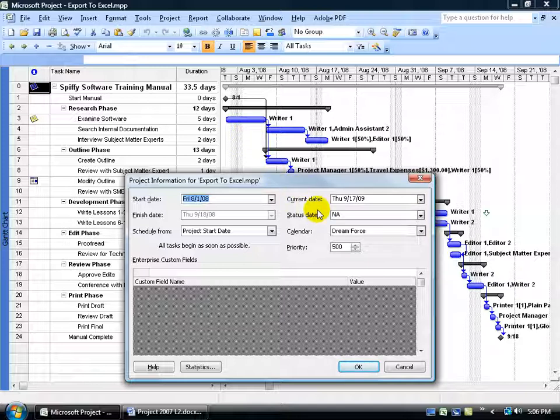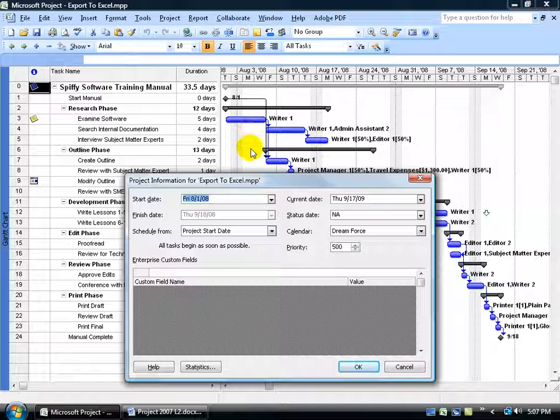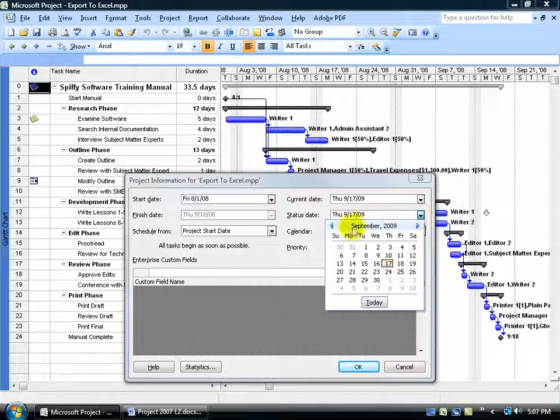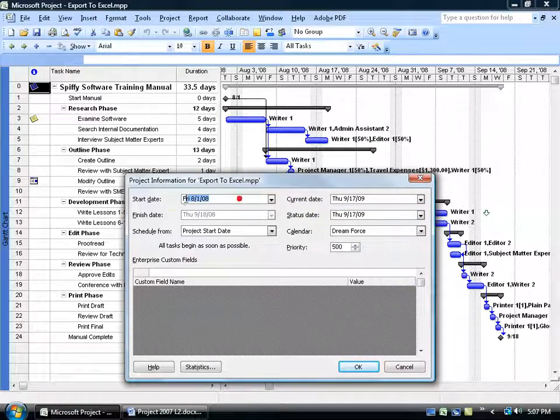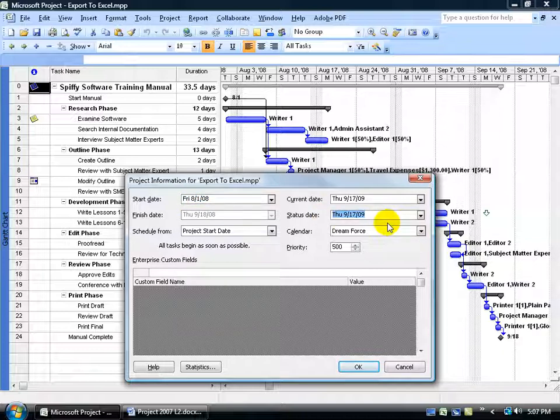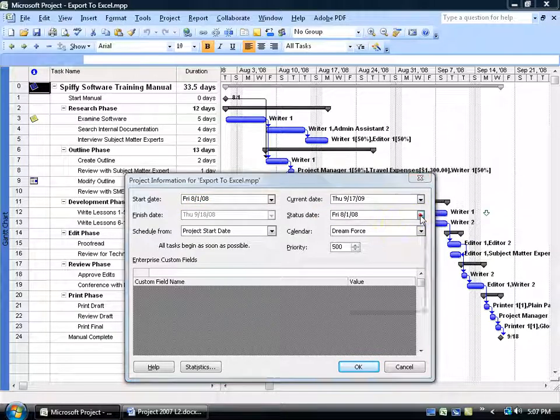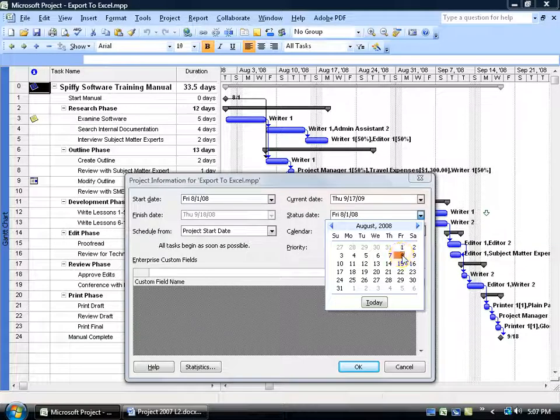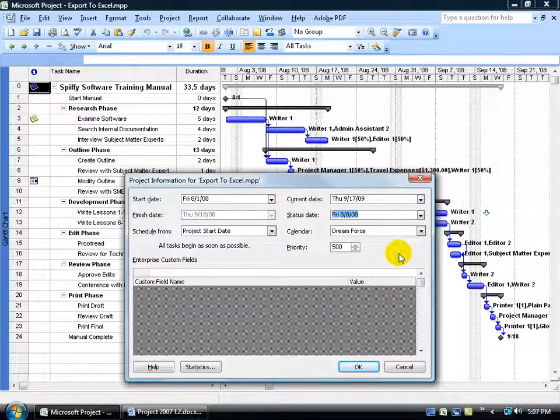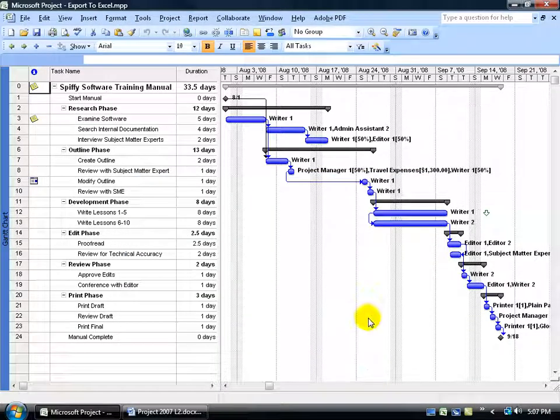So what I need to do before I can actually see that point in time, because I'm going to be viewing that point in time over here in the Gantt chart with a progress line, is I need to set that status date. So I can click on the drop down arrow and scroll back to 2008, or better yet, select this date, copy it with Control C, come over here and select that date and paste over it with Control V. Then click on the drop down arrow, it takes me right back to 2008. Then I can just select August 8th, one week from the project start date, and click OK.